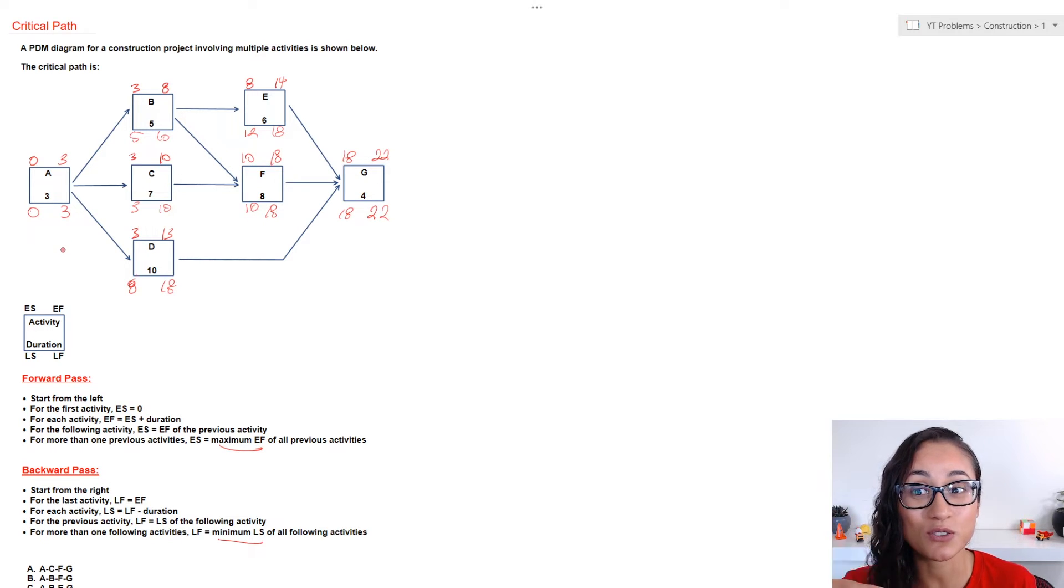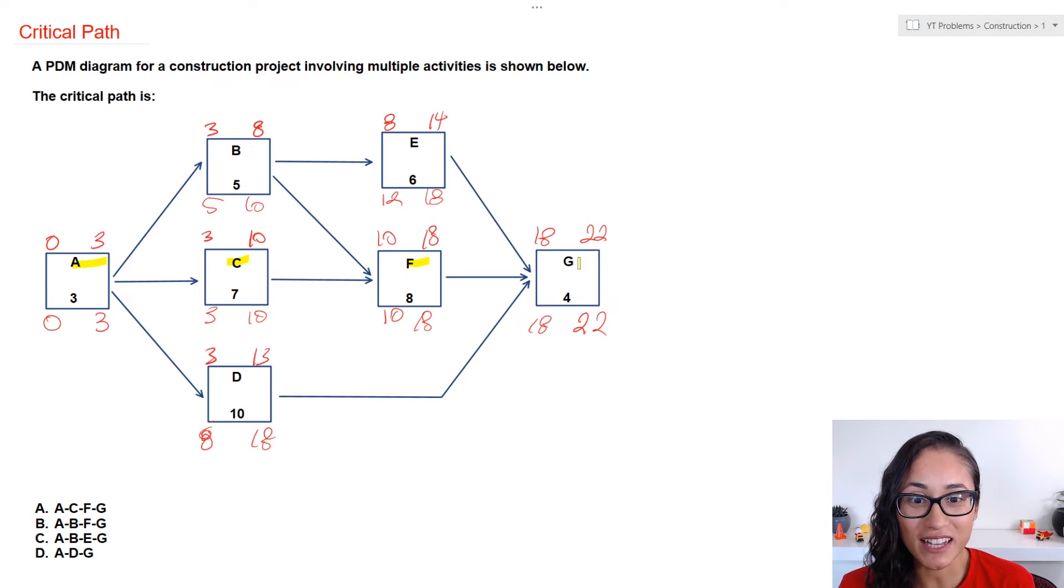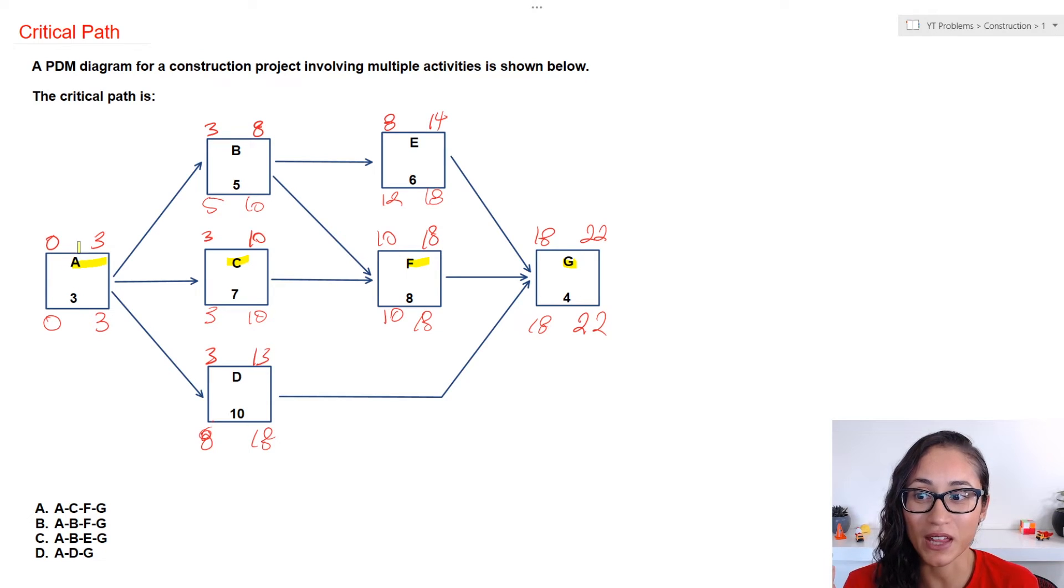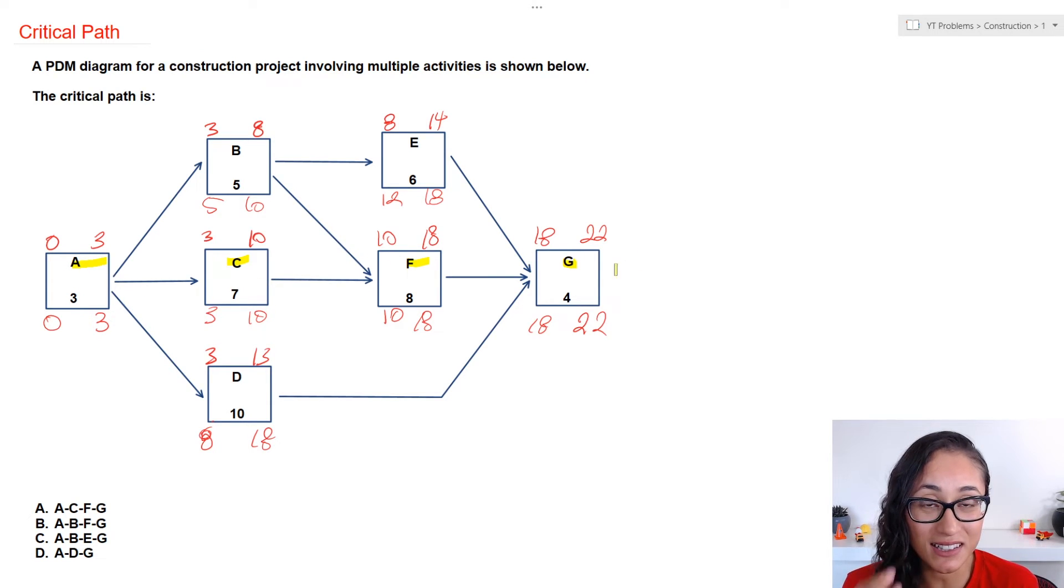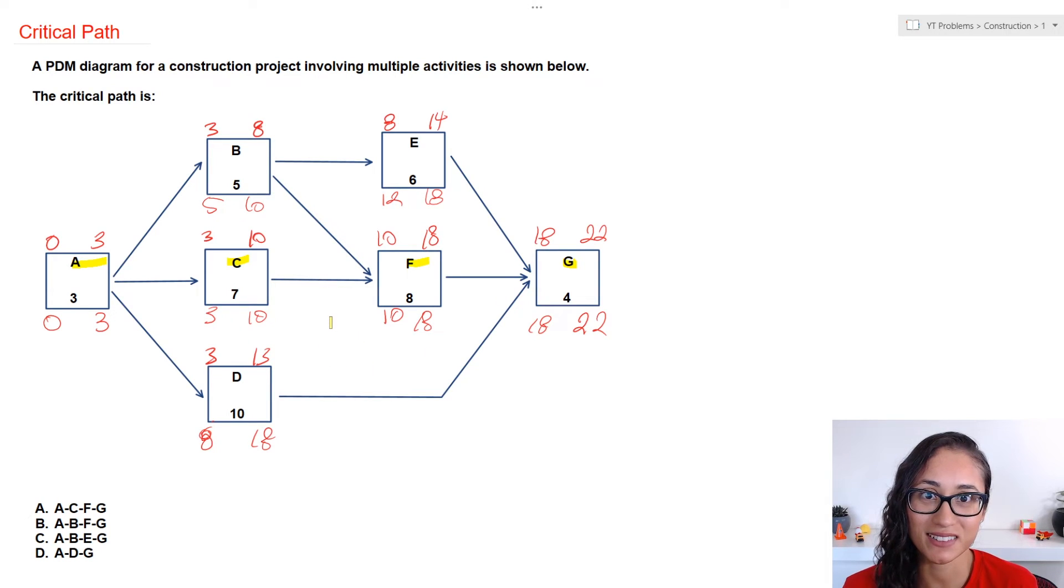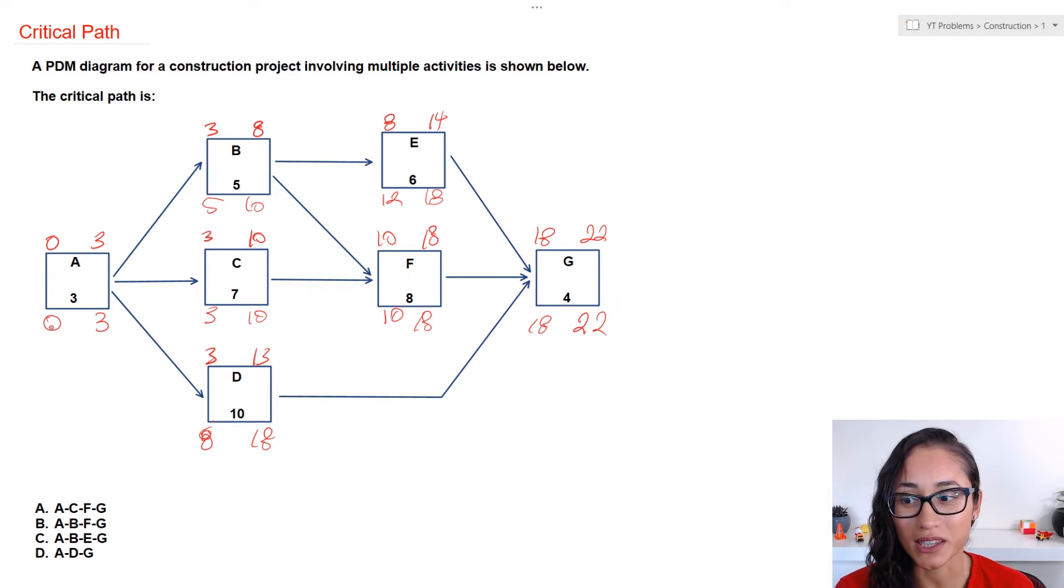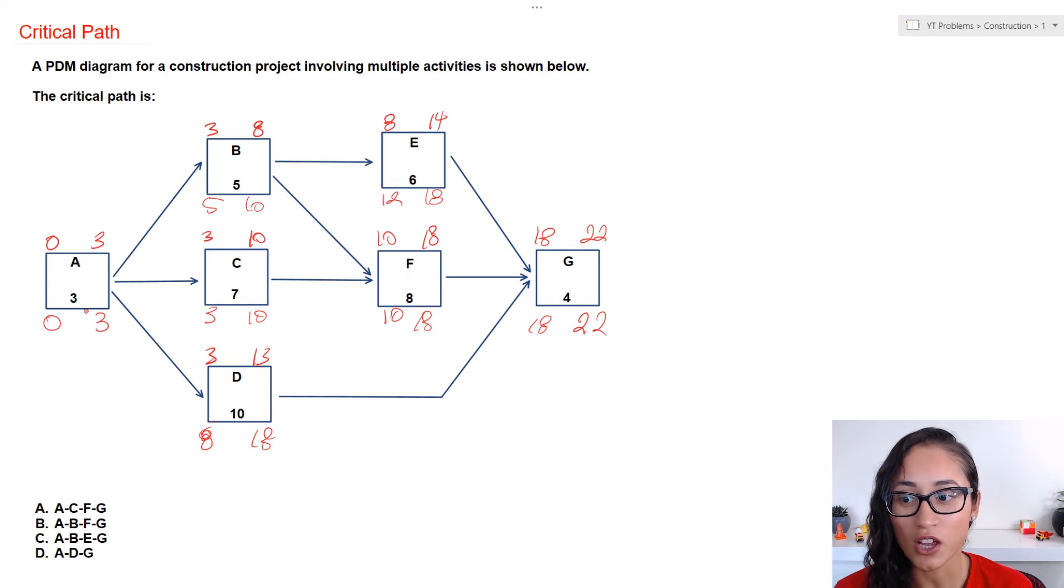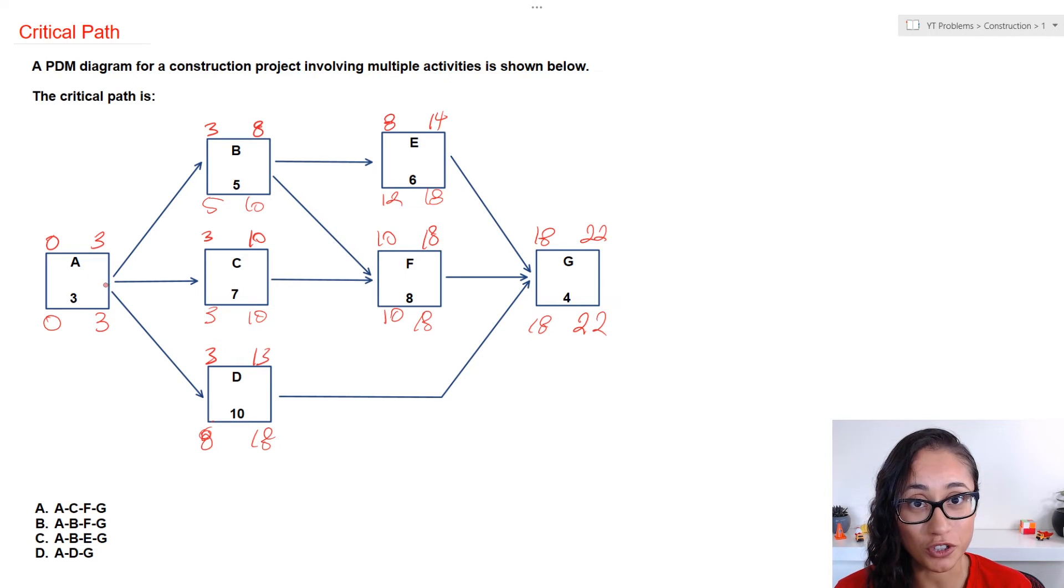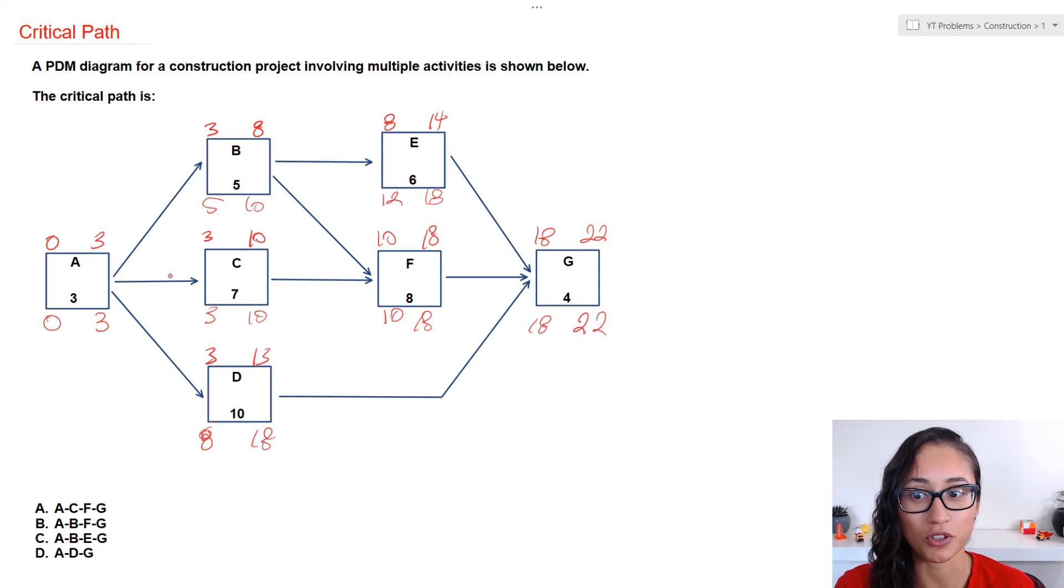Now, let's find the critical path. So, the critical path is A, C, F, and G, and that's because we have zero total float. What that means is that if any of these activities gets delayed by just one day, the whole project is going to be delayed. Now, the way we calculate the total float, we do the late start minus early start or late finish minus early finish. And so, if those give you zero, that means we have zero total float. And so, that will be your critical path. So, the answer is A.